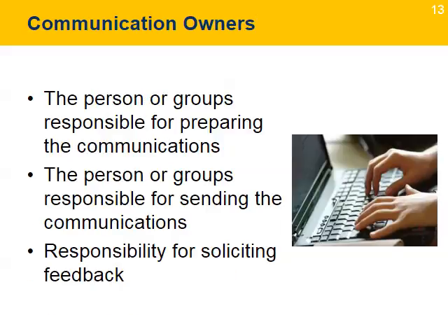The last element of the communication plan identifies the person or groups responsible for the various project communications. Depending on the communication governance and policies and procedures of the organization, different people may have different roles in the communication plan. For example, the project leader will be responsible for all communications with the team, partners, and the donor on matters related to the project activities, but team members may have responsibilities communicating with their counterparts in partner organizations to coordinate project activities. An important component of this responsibility is to request or receive feedback. The feedback helps understand if the message was received as intended and helps improve the communications plan.